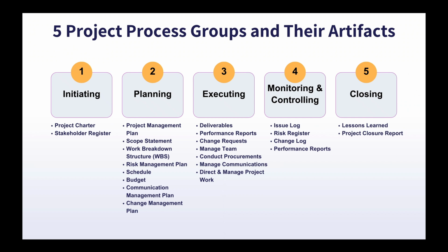For the initiation process group, this involves defining the project at a high level and obtaining authorization to start the project. So if you are a project manager, you would typically have these documents ready because it authorizes that you can now go ahead and utilize the organizational resources to deliver the project. As part of this process group, we also have the stakeholder register, where you would identify all the key stakeholders for the project and then identify their influences and their interests, and based on that,